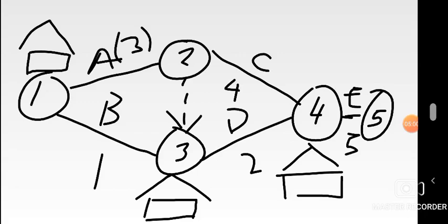On the box, we'll be putting the earliest starting time, and I'll be explaining as we move. That triangular shape on top, which is like a heart, we'll be putting the latest completion time. These are things that they abbreviate in books as EST, which just stands for earliest start time, and then latest completion time, in some books abbreviated as LCT. So that's what we'll be looking for practically.